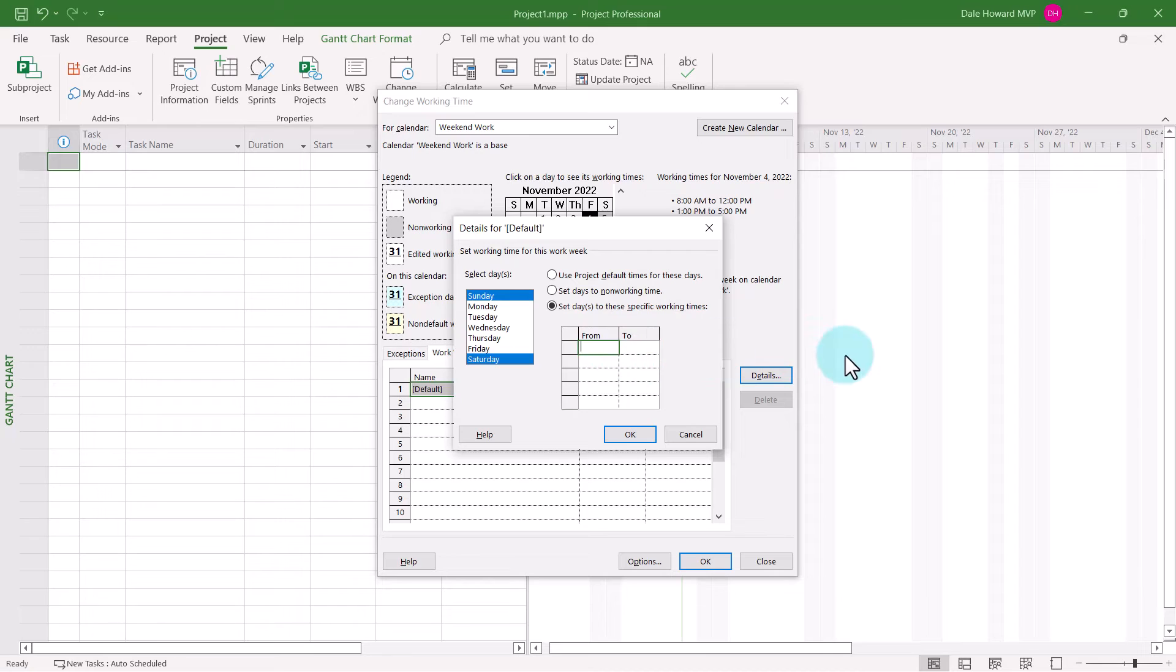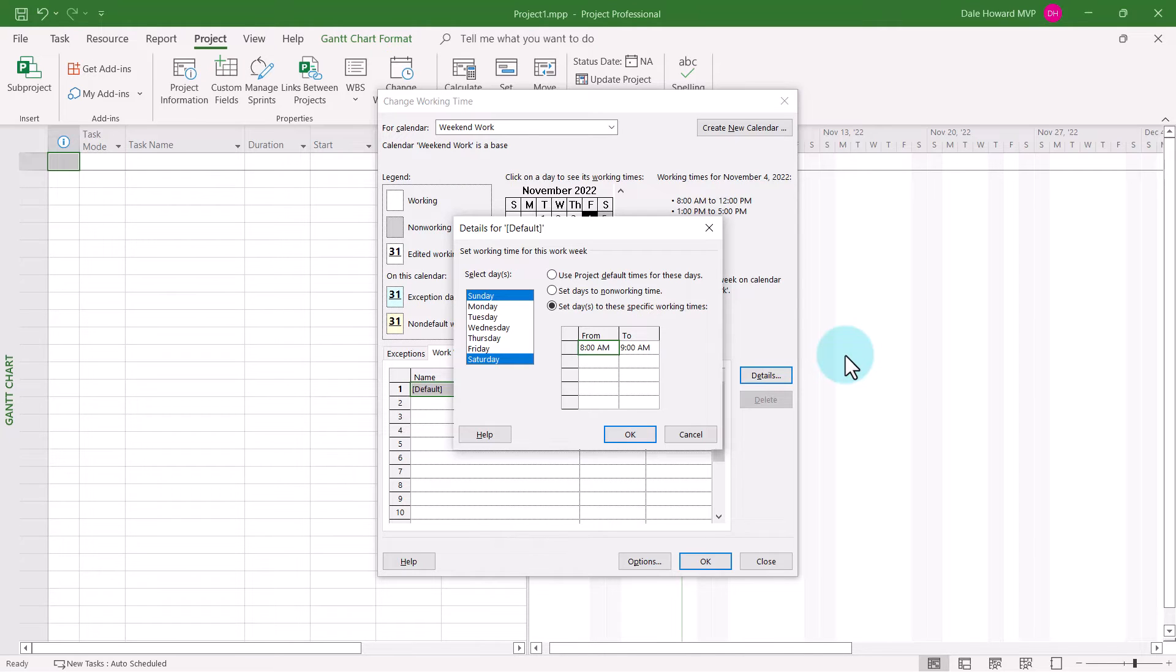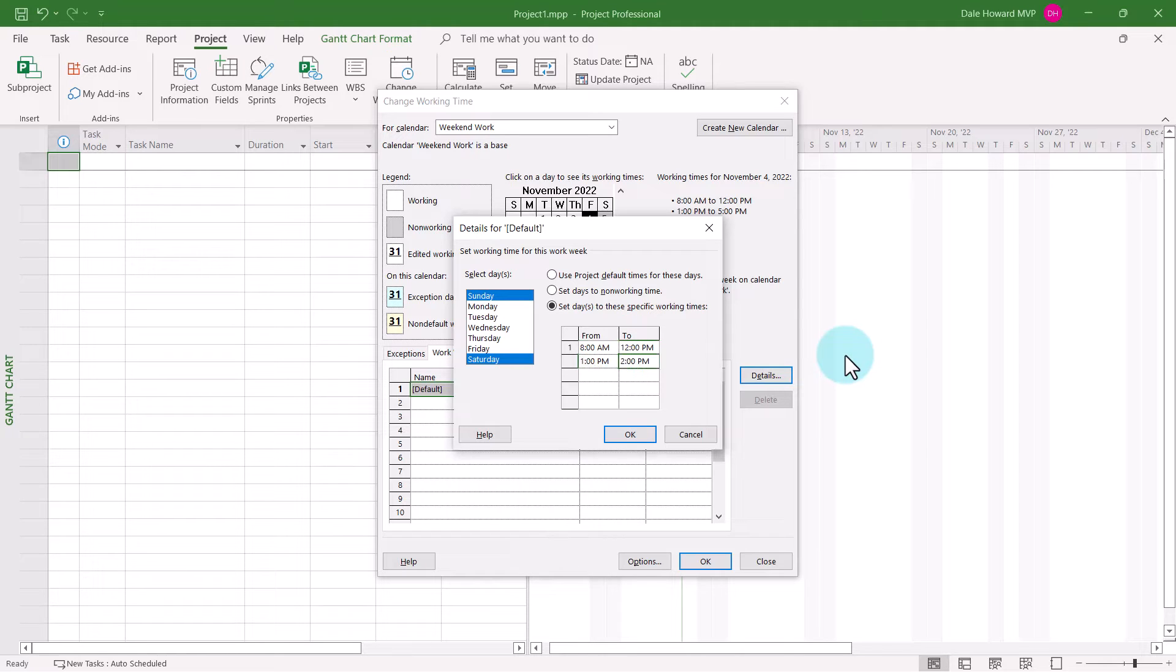And in the data grid, I'll put in the working schedule. That's 8:00 AM to 12:00 PM and 1:00 PM to 5:00 PM.